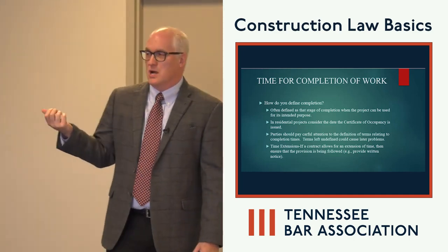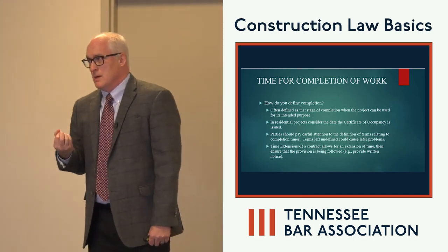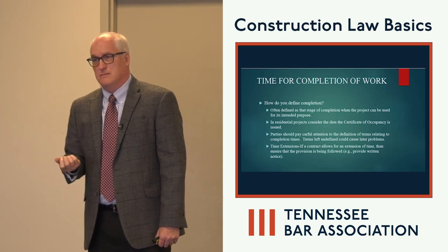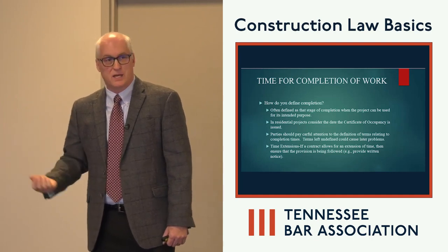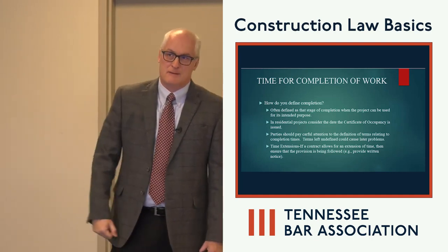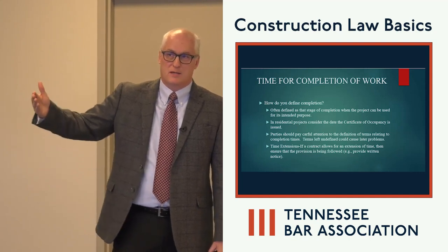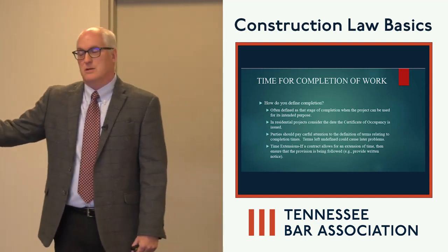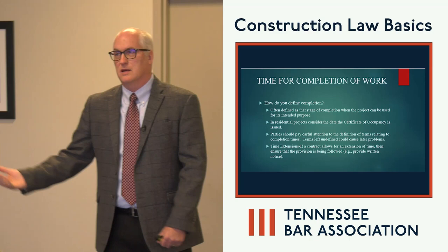If and to the extent there's a contract that has a time extension provision, and not just construction contracts, but contracts in general, make sure your client's following what they need to do. If they need to provide notice by certified mail by X amount of time, or a certain date, then have them do it.